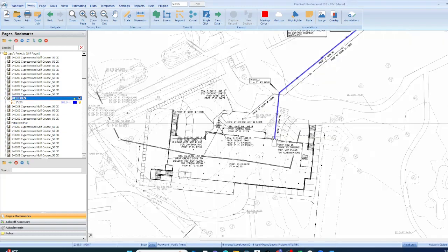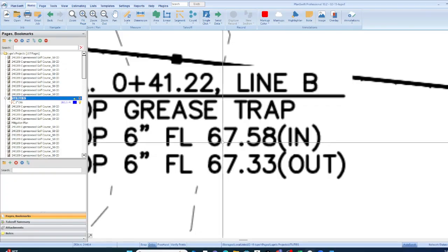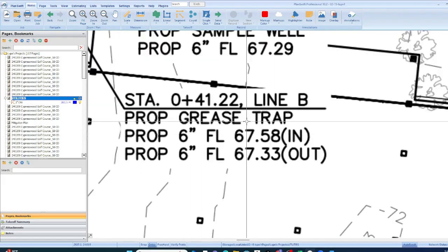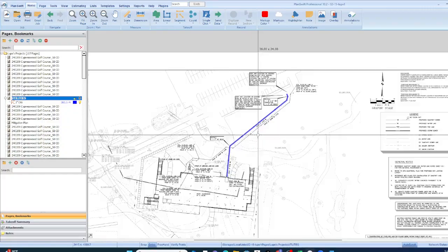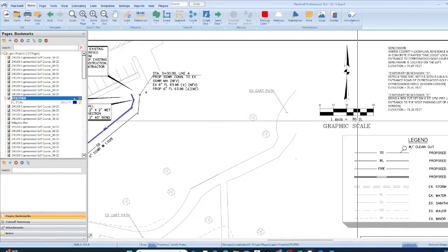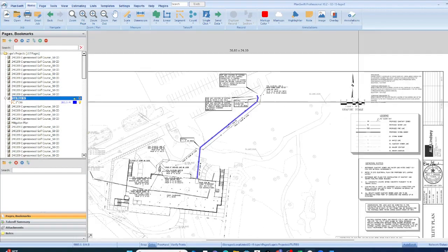Okay, now underground utilities. Everything is shown here. This means something. This tells us the size of the pipe, what it is, and tells us the GPS coordinate of where the pipe is coming in to that grease trap and where the pipe is going out. So if you do this for a living, it's really important that you're able to read these plans. So we put this to scale, and for every 1 inch, it's really 30 feet. So we scale it, then we measure it.